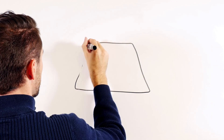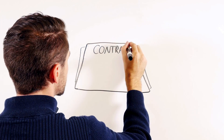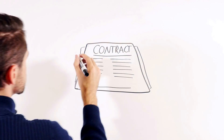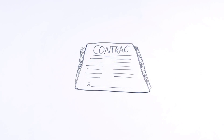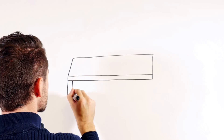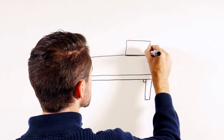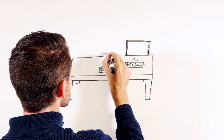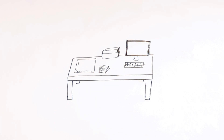Once the school district awards the project to a construction company, the build stage can begin. The construction company, in turn, awards the contracts for the materials and labor they need to secure. Once a contract hardware distributor, as a subcontractor, gets awarded the job, this distributor details the job, identifying the exact products for every opening on the job. The distributor will order these materials from the door and hardware manufacturers, timing the materials' arrival to the project schedule.